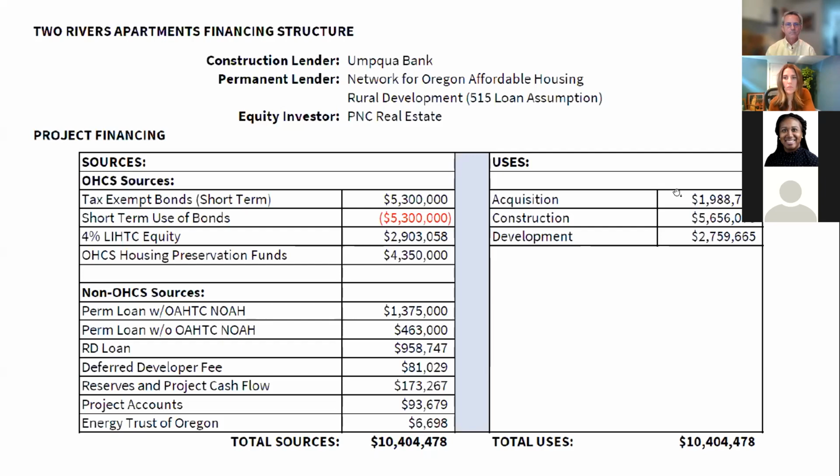So usually, I don't think we've ever had more than maybe 3 tenants that have had to be relocated in the last few years. So we've been pretty fortunate as far as permanent relocation. But on the temporary, we have a pretty good formula that works pretty well. And our construction team, we know how long it takes to get units. We usually do a building at a time so we can move tenants around that way. So hopefully that helps.